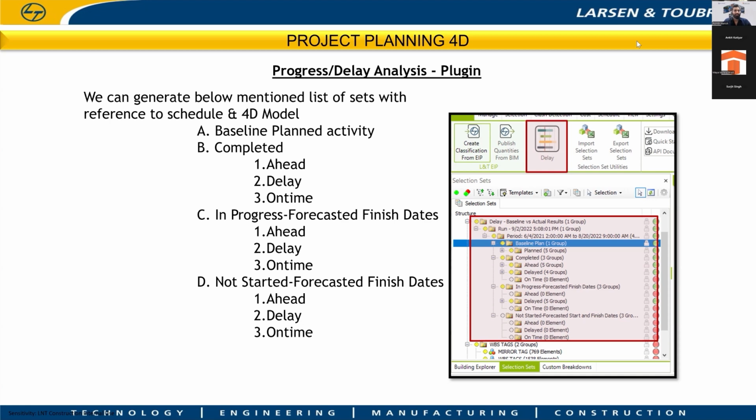Great. So this will generally be done by the BIM coordinator on site, or how is it generally? Yeah, we encourage a field BIM coordinator who always updates the 4D model at site, but the information comes from the execution team. We encourage all the site people, from execution, planning, and quantity, everyone, and we give access to ACC so everyone can access the model through the cloud. We have that culture where people take an iPad or their smartphones and access the model at site, and all this information can be brought from site through CDE.